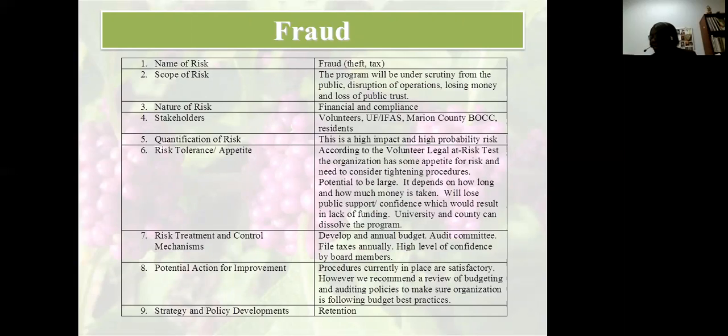Customer satisfaction is important to us. And we have to consider the range of outcomes above and below the target that would be acceptable. So for example, if our target for customer satisfaction rating is 90%, we may tolerate outcomes between 88 and 95%.